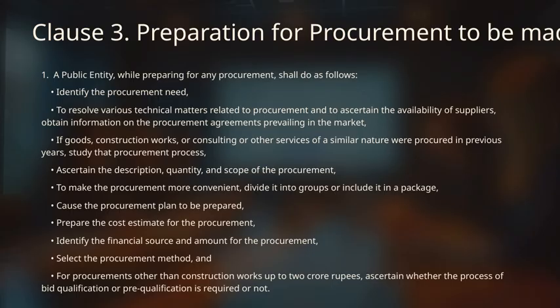And for procurements other than construction works that are up to 2 crore rupees, we must determine whether bid qualification or pre-qualification processes are necessary. All these steps help us ensure a transparent, efficient, and well-planned procurement process that aligns with our overall objectives.